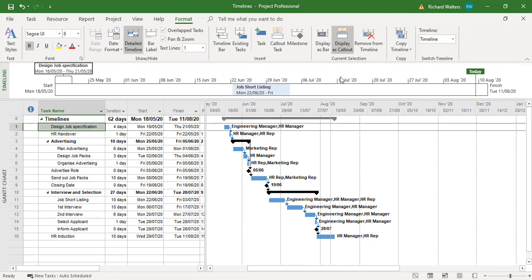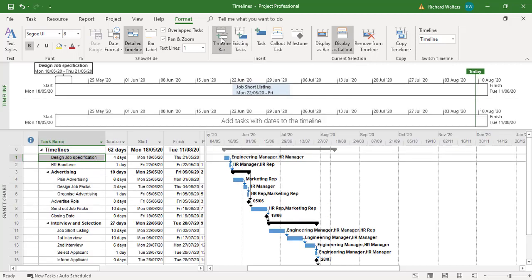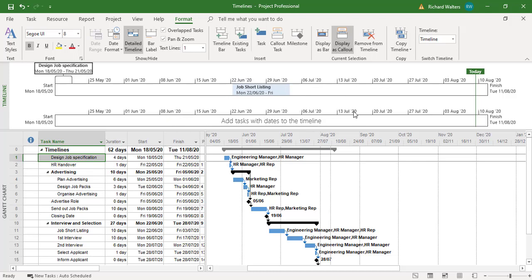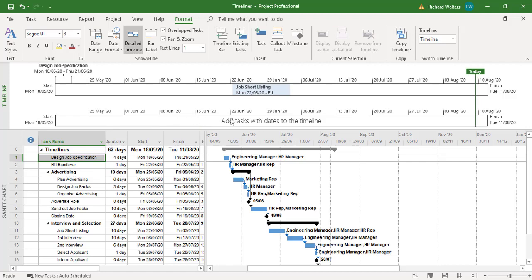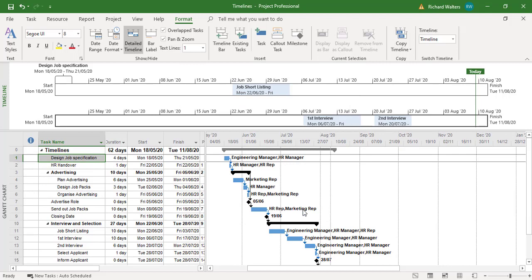You can also add a second timeline bar. There's two of them now. The reason why you might want to do this: if you add too many tasks to one bar it'll get cluttered. So you might want to add to the second one. So I can click on it and show different tasks. Say okay I want to show first interview and second interview. And now it shows you're on the second bar.